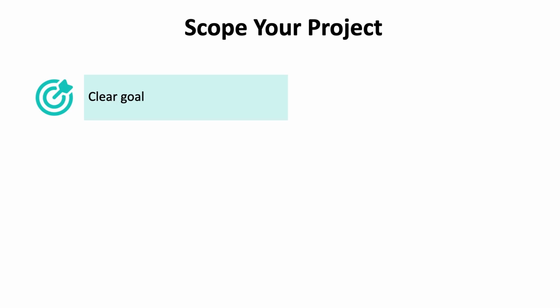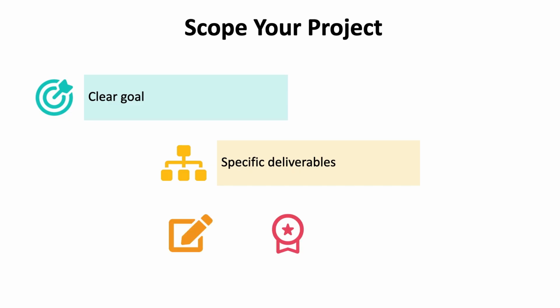Projects often flounder because the end goal is not clear. Your end goal should be to successfully finish this course by completing a double-star research project that will contribute to scientific knowledge and, in the process, also increase your knowledge of how scientific research is conducted. Keep in mind that you have 3 specific deliverables that are due at specific times that need to meet stated requirements. The 3 deliverables are a research proposal, a paper submitted for publication, and a public presentation describing your research. There are also some intermediate deliverables in terms of drafts of your team paper.